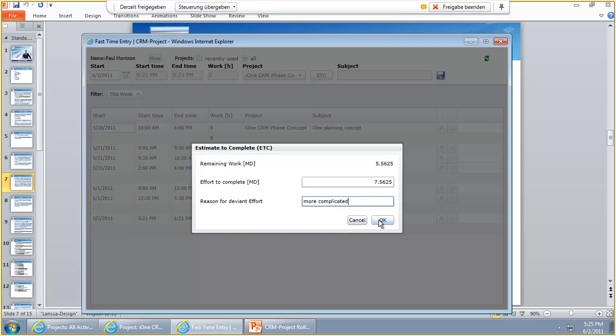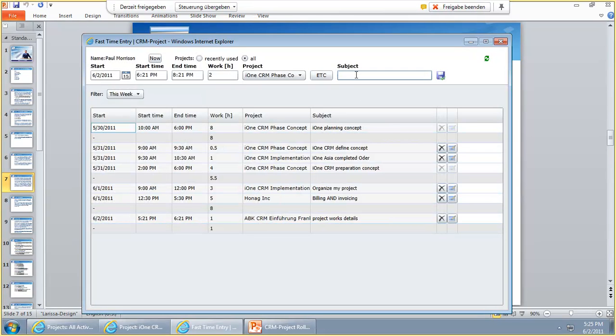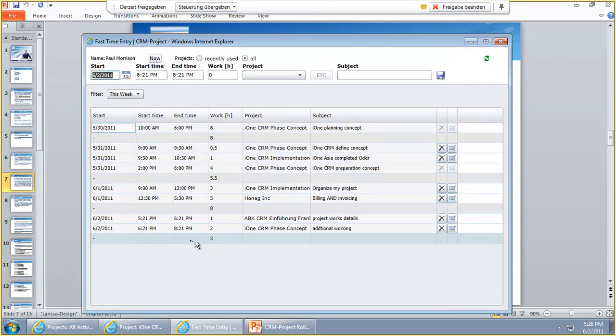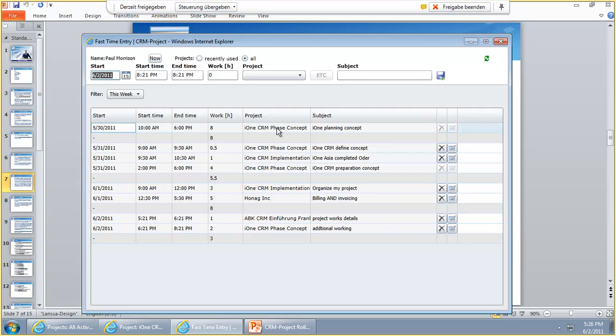By this I trigger a workflow in the background and you can choose how this workflow acts. This workflow can act this way that it automatically grants the effort to complete rising or lowering in the project, or that the project manager is informed only, or the project manager has to confirm this other effort to complete that was planned. As soon as I click okay I can close this subject here with additional working and save and close it so it appears here on my daily schedule.